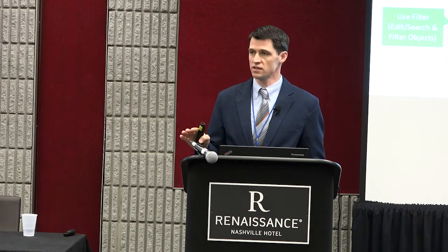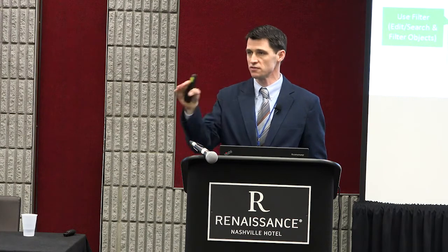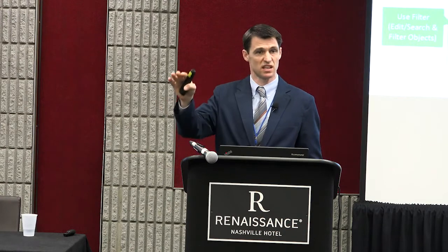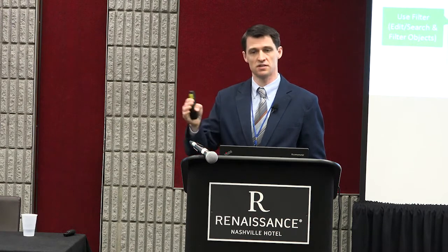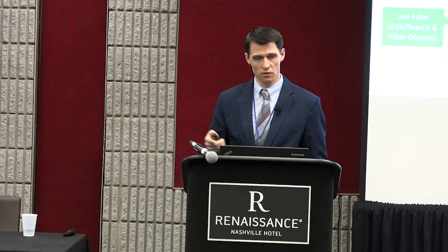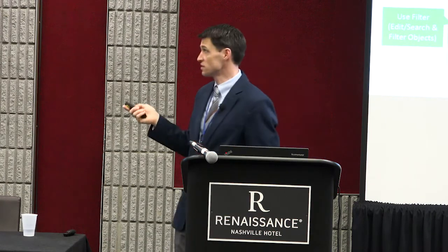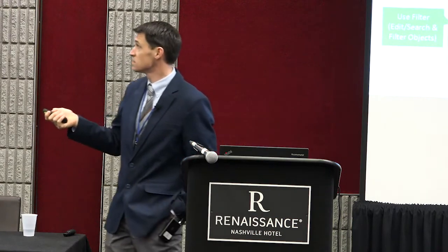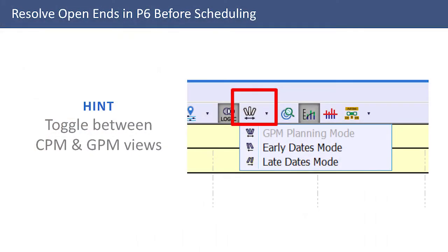Works great in planning sessions for Netpoint because you can just fly. You can be adding activities on the canvas and they stick there, right? One of the downsides is when they stick there, you may have open ends without thinking about it. So we use a couple of tricks. One trick is I like to go between the CPM and GPM view.